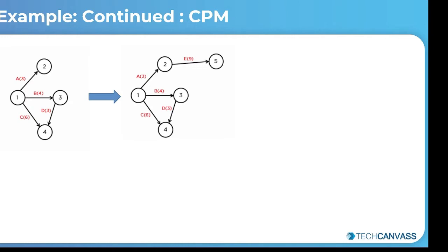Now, if we look at activity F, it's preceded by activity A, and a combination of F, G, and H act as immediate predecessors for activities K and L. So let's wait before we take it up. Instead, let's shift our attention to activity G. It's preceded by B, as shown in the previous slide. So we'll draw it like this.